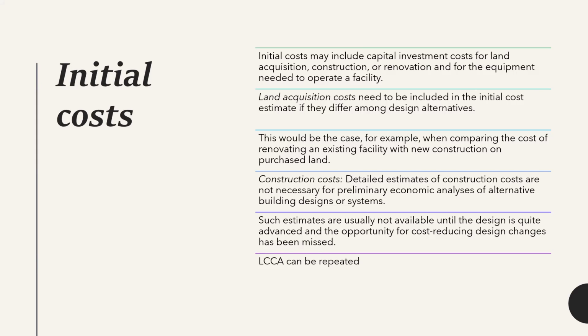design changes has been missed. So if we put the detailed estimates of construction costs at the very beginning, there's a high chance of missing the reduced cost with design changes. So this LCCA, life cycle cost analysis, can be repeated after we have detailed estimates as well.